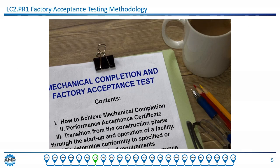Factory acceptance testing, or FAT, is designed to identify pre-delivery non-conformities while assets are operated as designed but not yet installed for production. This process saves a lot of money by identifying problems while the equipment is still at the vendor facility. Any issues can be corrected quickly and relatively inexpensively compared to the cost of changes after installation. The FAT processes and associated detailed test plans should be formally developed, executed, and treated as controlled documents. Detailed test plans should address all operational configurations, including safety system challenges like emergency stops, safety valve actuations, and interlock verification.